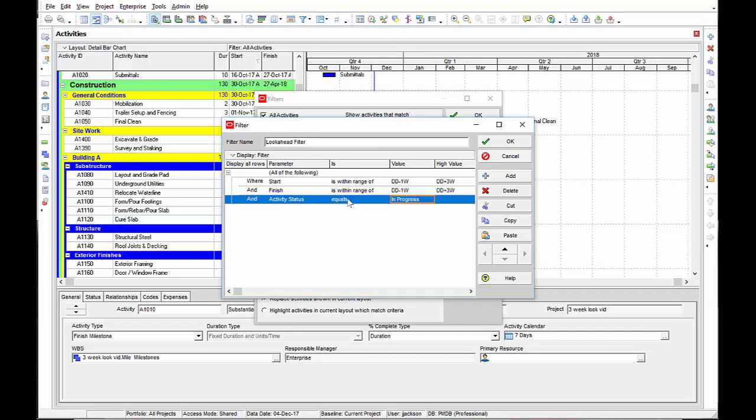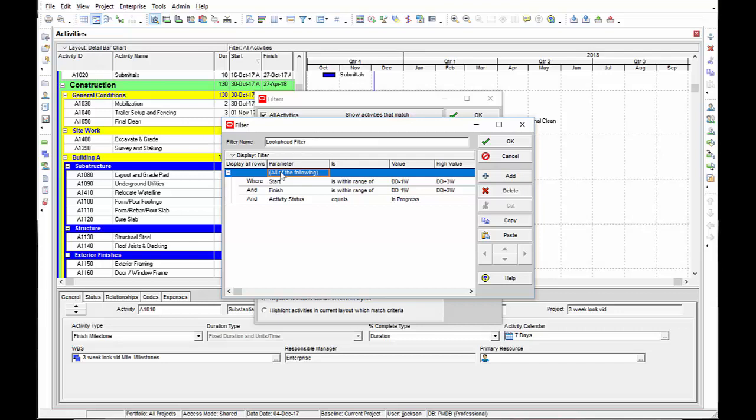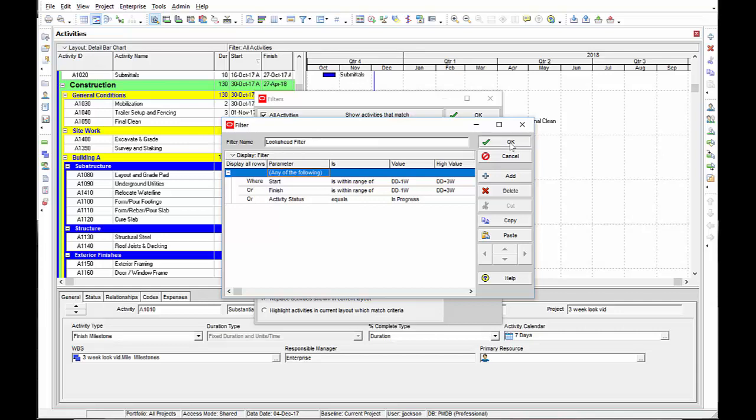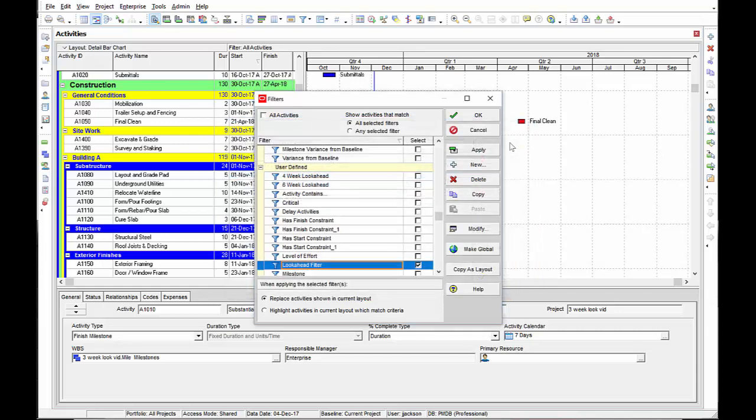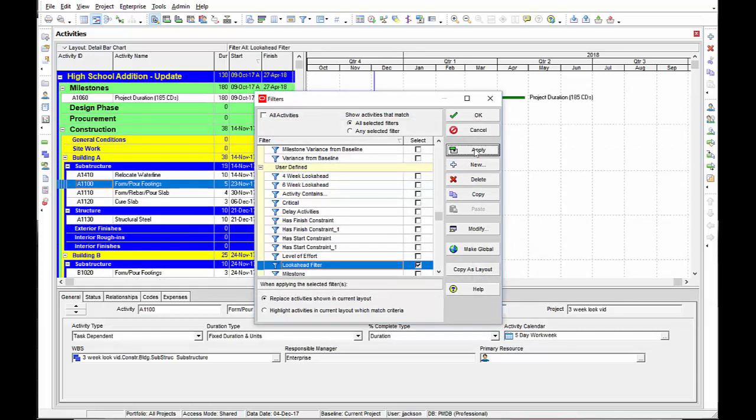Finally, the last thing I want to make sure I do is select any of the following parameters for my filter. If I have all of the following selected, nothing will show up because no activities will meet all three of these. So let's change that to any, select OK and select apply.